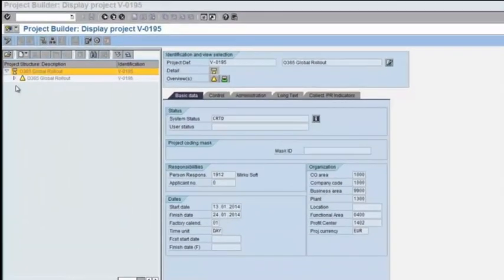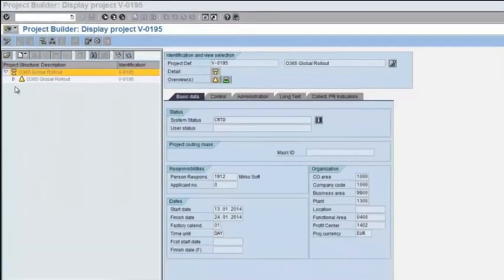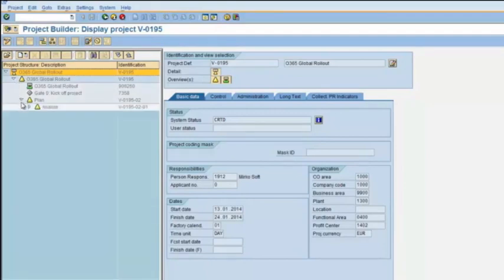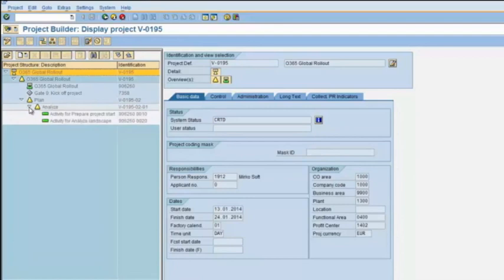Let's have a look at the corresponding project in SAP. The project structure is consistent with the schedule in Microsoft Project. Structure elements are set accordingly to the task flagging and IDs are aligned. All further modifications of the schedule will be reflected in the SAP project structure.